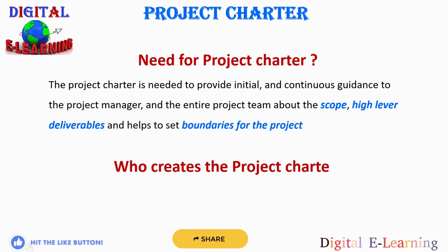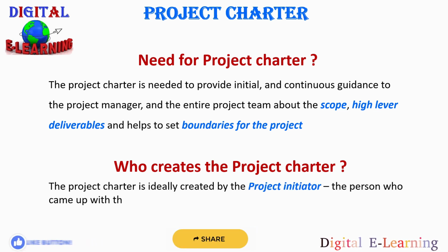Next is who creates this project charter. The project charter is ideally created by the project initiator, the person who came up with the initial idea for the project. The initiator may then find someone in the organization to sponsor the project and get the job done. In some cases, the initiator will delegate the task of writing the project charter to the project sponsor as well.